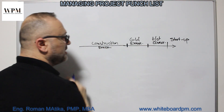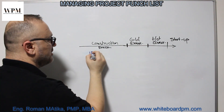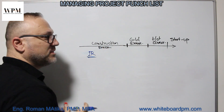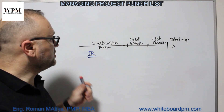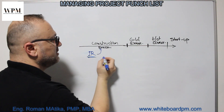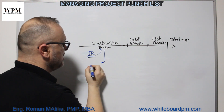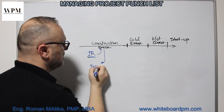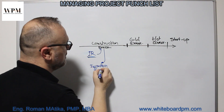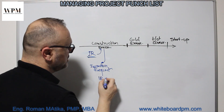Once we are in the construction phase, there are IRs — inspection requests — submitted to the client to make sure the client is inspecting everything and giving comments. The comments are given through an inspection request, and it is the IR punch list.